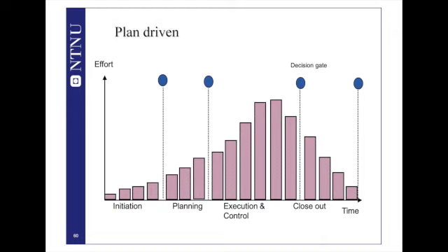But during the project, there is less involvement, which means that this type of plan-driven approach can result in many surprises. Suddenly, at the end or at the closeout, the customer or the end users might come and say, well, this is not what I wanted, I wanted something else, because simply they were not involved in both the planning and execution stage.